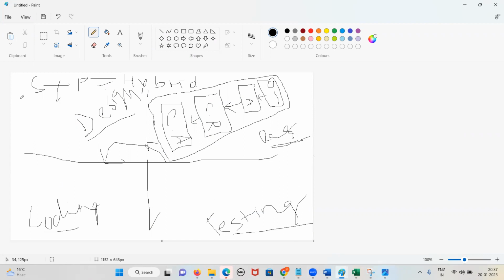Now the one application we have divided into how many modules? Four modules: A, B, C, and D. Yes or no, guys? For module A, we will design and develop the prototype, get the customer approval, and then we'll do the actual designing of requirement of A, coding of A, testing of A, and then we'll go to requirement of B. Then we'll go to the customer, take the customer approval on the prototype developed for B, and then we'll do the actual designing, coding, testing for B. Similarly, we'll do the rest.